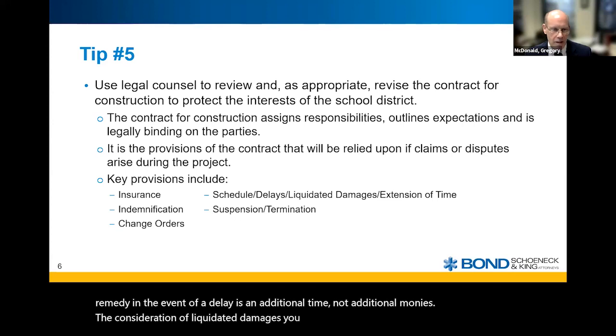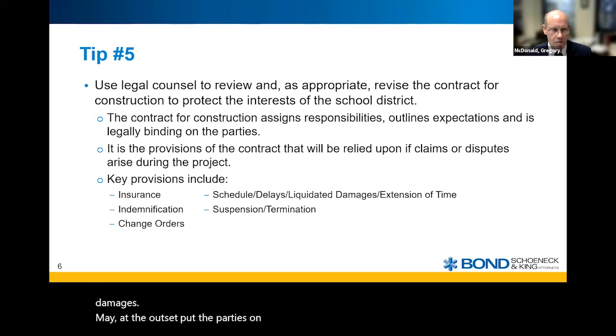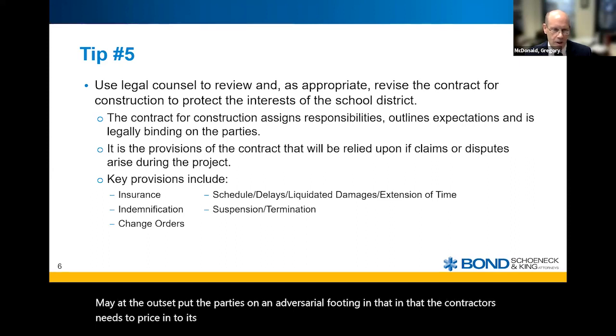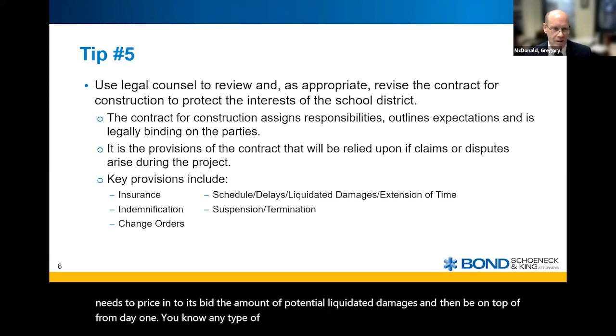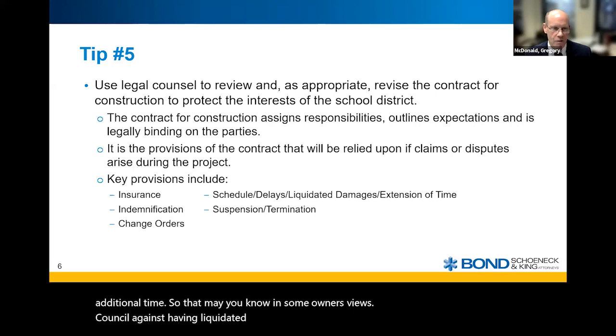There are different philosophies on including liquidated damages. Some owners believe that having liquidated damages may at the outset put the parties on an adversarial footing, in that the contractor needs to price into its bid the amount of potential liquidated damages and then be on top of any type of schedule slippage from day one, where they think they're entitled to additional time. So that may, in some owners' views, counsel against having liquidated damages and then default to actual damages.